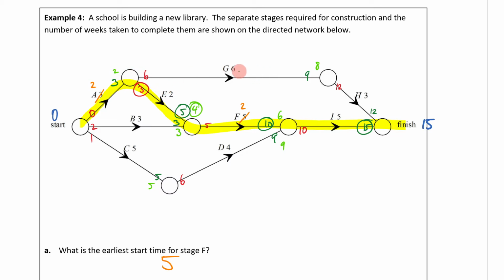This will be 2 plus 6 is 8. We already said that. 8 plus 3 is going to be 11. This will be 6 plus 5, which is also going to be 11. Now, have I done that correctly? No, whoopsie daisy, my bad. Circle the bigger number. 9 is the bigger number. 9 plus 5 is 14. So that means it's now going to take 14 to complete this.